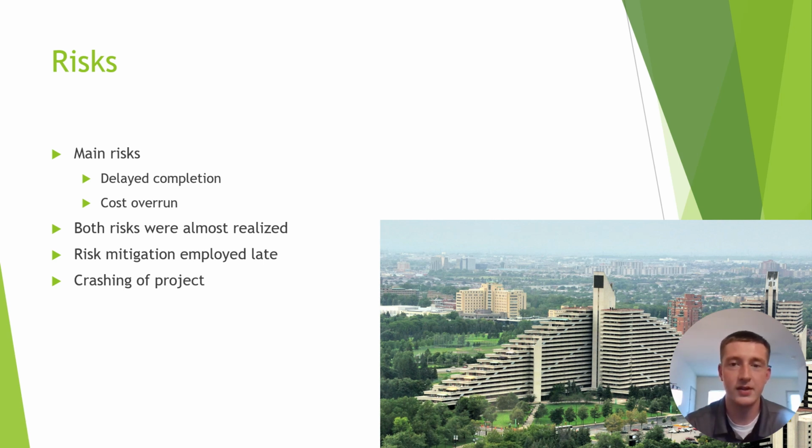Mayor Drapeau initially claimed the project would cost the city $124 million. However, the problems faced by the project managers caused the final cost to reach $383 million in operational expenses and $1.21 billion in capital expenditures for the International Olympic Committee. Though the risk of project completion being late was not ultimately realized, the acceleration of the project caused the price tag to skyrocket. In project management, using overtime to provide more labor as a means to move the project's completion date earlier is called crashing of a project.